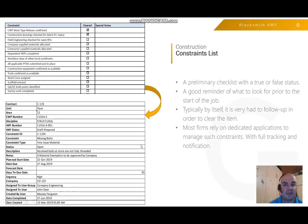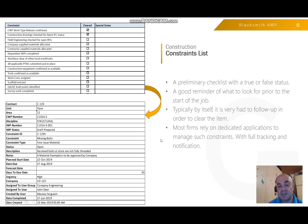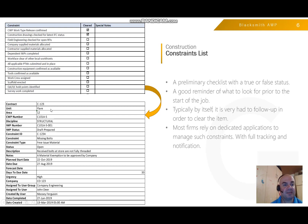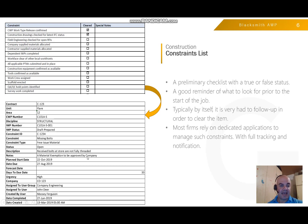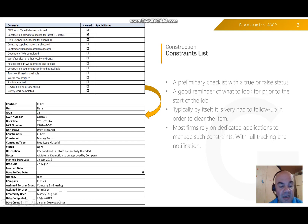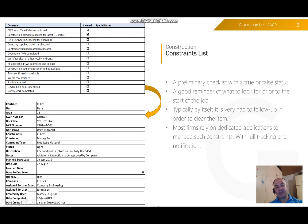Regarding the constraint list, most tools in the market have a very limited constraint management list, which is why most companies get a separate system to manage it. For example, a construction drawing check for latest IFC status might just be a true/false tick, but in reality you need a single constraint entry with many properties — most importantly who it is assigned to and which company — so you can follow it up. This is an improvement we made: using an actual application to manage constraints rather than a small checklist that cannot really be tracked.